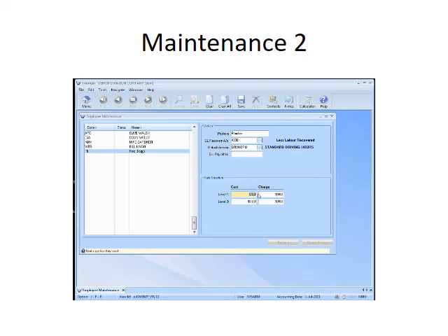For many people, this causes a lot of confusion: what is the cost of an employee? Commonly, people coming into my office tend to say the cost is what we pay the person. But when you stop and think about that, you go, well, hang on, I'm also paying their superannuation on top of that. I'm paying their payroll tax. I'm paying their workers' comp, and I'm then administrating people. So normally the actual cost of an employee is far higher than what you're physically paying them.